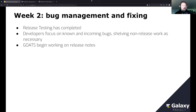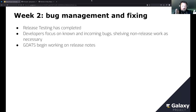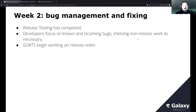The next week, release testing is completed. Most bugs that come out of this are destined for the UI/UX and backend groups. Fortunately both of those groups have weekly meetings, so for the next two weeks those meetings should be focused pretty much exclusively on the state of the bugs for the release — making sure they're assigned and that people working on them have the tools they need. Developers focus on known and incoming bugs, and non-release work is shelved to the extent necessary.